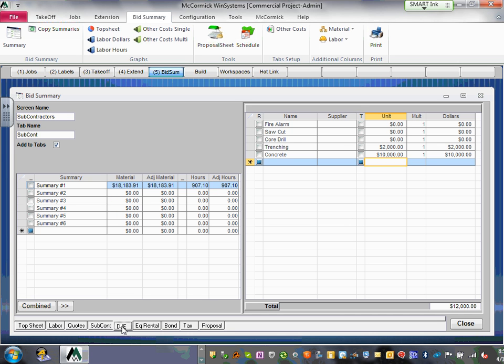Direct job cost. Let's go to your direct job cost. For direct job cost, guys, let's start with the telephone. We need a trailer there, so we need a telephone, $1,000 for the telephone. We need a trailer, telephone, permit. Let's go to the trailer. We own it, but we need to put a grand for it to adjust. Trailer permit fees. Let's put a grand for all the permit fees.